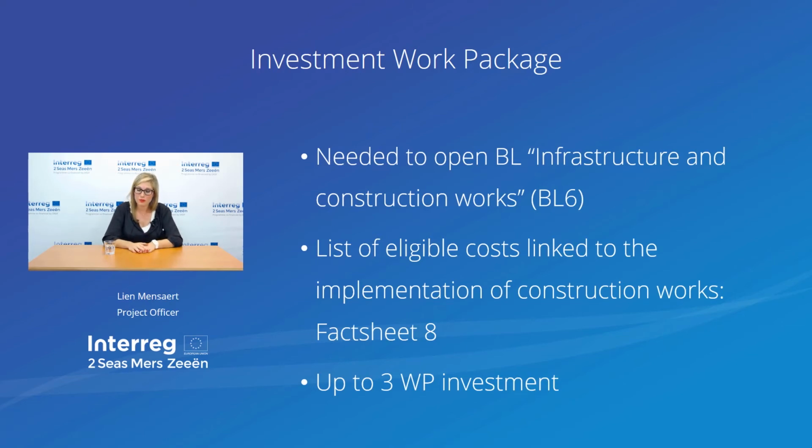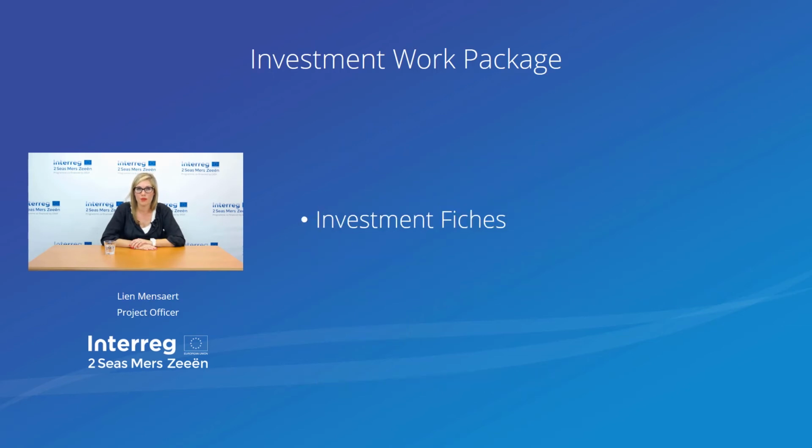For example, you have a pilot that you want to realize in your project, and 3 of the partners will do an investment that is contributing to this pilot. If they all have a similar investment, then it would be in only 1 investment work package. If the pilots would be very different, complementary but different, then we would advise you to put them in a specific investment work package that would be separate from each other.